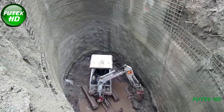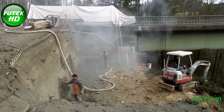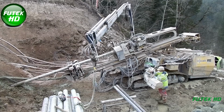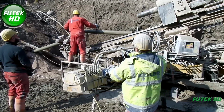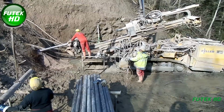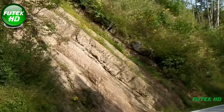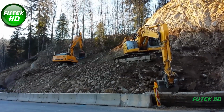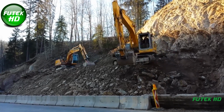The new Brunstabel Bridge project was designed to allow for uninterrupted traffic flow by building the new structure adjacent to the existing bridge. This method not only allowed for continuous traffic movement throughout construction, but also introduced significant safety enhancements. The improved ramp alignments and connection points on both sides of the bridge offered smoother transitions and better visibility, greatly enhancing the bridge's overall safety.